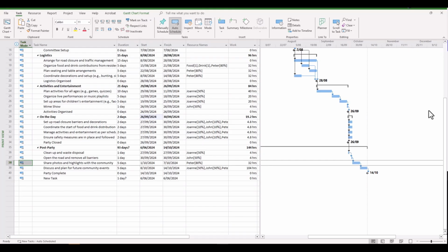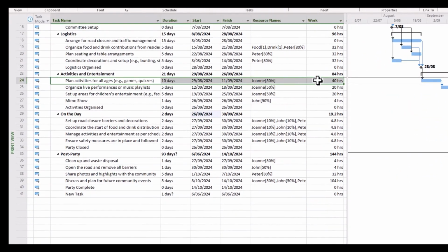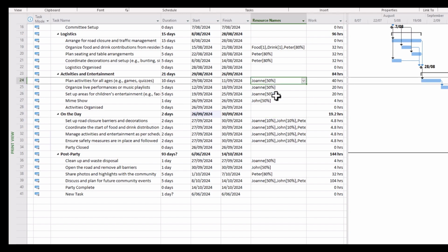But sometimes as we're wanting to make adjustments to the schedule, we find that problems arise during these situations. Take for example this particular task here. We might have received some new information to show that this task doesn't take 40 hours worth of work, but takes 20 hours. So we might think that since we have fixed duration, we can simply make an adjustment to the resource loading and adjust the work this way.